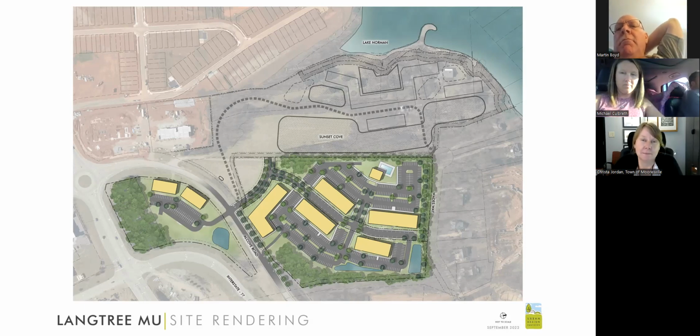When do you expect construction to begin? That's a great question. Chuck, do you have a little bit of clarity on your intent on moving forward here? Sure. I think once we're through the public process, typically, depending on how quickly drawings move and city municipal approvals happen, we can start anywhere between 6 to say 10 months after that process is done.